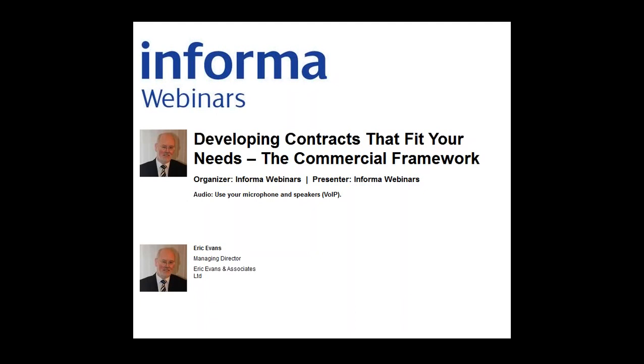And the question is, how much of that can you actually recover from your supplier who was initially late delivering to you? The contract needs to be absolutely clear on what is down to your supplier to pay and what is known as consequential loss, which may or may not be down to the supplier, depending upon what you build into the contract. There has to be clarity around the contract.